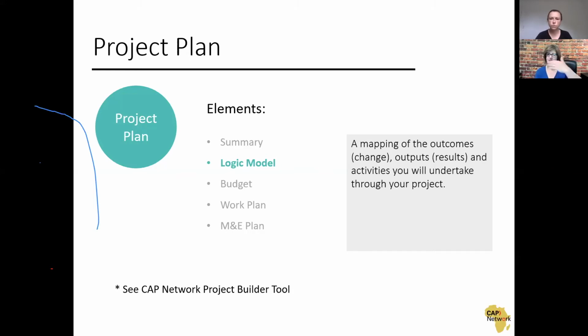That would be built out in your logic model. The assumptions and the connection would explain how you're going to ensure that training people and helping them develop new knowledge around farming techniques means they change their farming practice. You're making the assumption that with new knowledge, people will change their farming practices. How do you know that's going to be true? How are you going to assure that's true? That's the part that you explain in your theory of change. That makes sense?